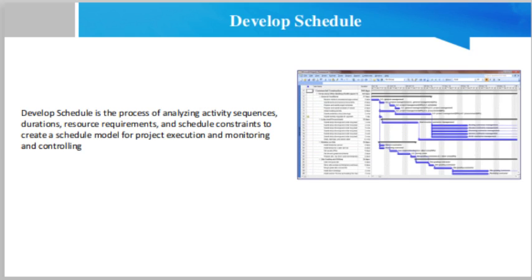This schedule is then analyzed to determine conflicts with the logical relationships, and whether resource leveling is required before the schedule is approved and baselined. Revising and maintaining the project schedule model to sustain a realistic schedule continues throughout the duration of the project.